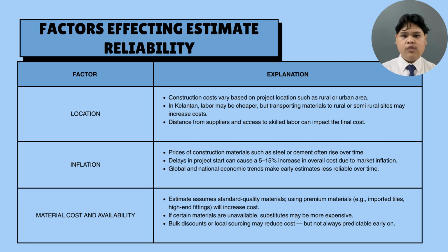Inflation also influences estimate reliability, as the price of materials such as steel or cement often rises over time. Delays in project start can lead to a 5 to 15% increase in cost due to market inflation, and broader economic trends may make early estimates less dependable.